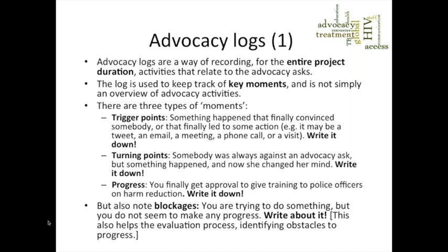So advocacy logs are a way of recording, for the entire project duration, activities relating to the asks. The log is used to keep track of key moments, key things that happen. You meet somebody in a corridor, somebody you're targeting with your advocacy, and you talk with them. What comes out of that meeting? Where do you record it? Well, you put it into the advocacy log.